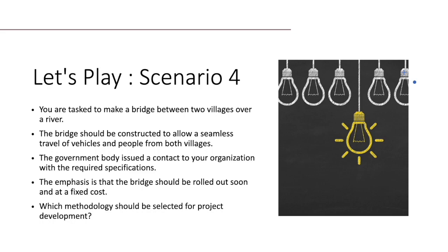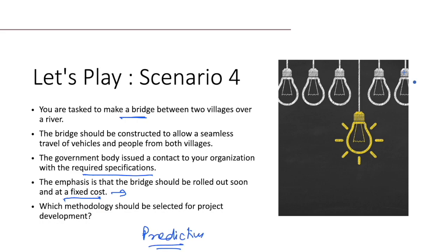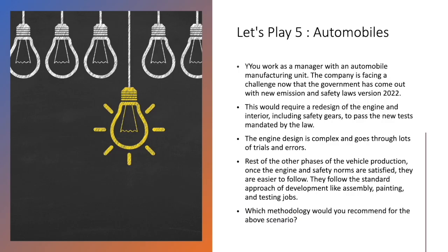Scenario four: you are tasked to build a bridge between two villages over a river. The government body issued a contract with required specifications. The emphasis is that the bridge should be rolled out soon and at a fixed cost. Keywords: fixed cost, required specifications, physical construction. If something is done wrong there will be enormous waste. The best methodology here — fixed requirements and emphasis on cost — is predictive.